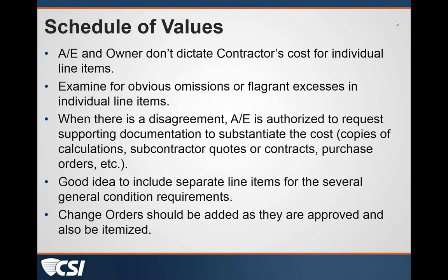When we review the schedule of values, it is not our role or the owner's role to dictate to the contractor what those line item costs should be. We examine them for obvious omissions or errors, but we are not dictating what those numbers should be. As an example, before I go on,